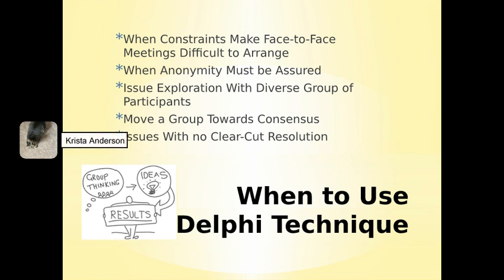While the Delphi technique has broad utility due to the use of the skills and insights of experts, there are scenarios in which it is more appropriate. One such scenario includes projects where cost and schedule constraints make it difficult to facilitate face-to-face meetings. Gathering information from participants remotely ensures that the project cost and schedule do not inhibit progress. Remote information gathering also allows for the identity of participants to remain anonymous. For certain projects, this may be a vital requirement.